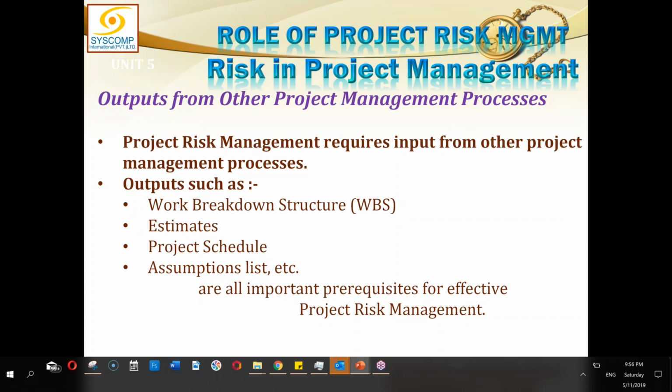We say that, okay, let us say the cost of a brick would be 5 rupees a brick, because I don't know. I have tried my level best to find out, but nobody told me how much it will cost. So I will base my estimate on this assumption of 5 rupees per piece of brick, and ultimately I will calculate everything. Later on, this assumption may be declared wrong or right even.